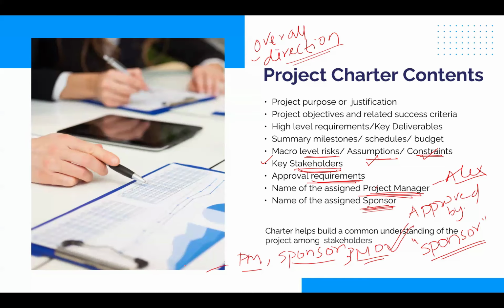So these are possibilities when it comes to creating the project charter. I say so many possibilities because there's no one thing that is seen across. All of these are seen in some organizations, PM somewhere, sponsors somewhere, PMO somewhere. But here PMBOK says something I would add. Project manager should be preferably part of charter creation. It's preferable. It can always happen that PM was not involved and sponsor directly created it, but that's not preferable. Preferably the PM should participate in charter creation.